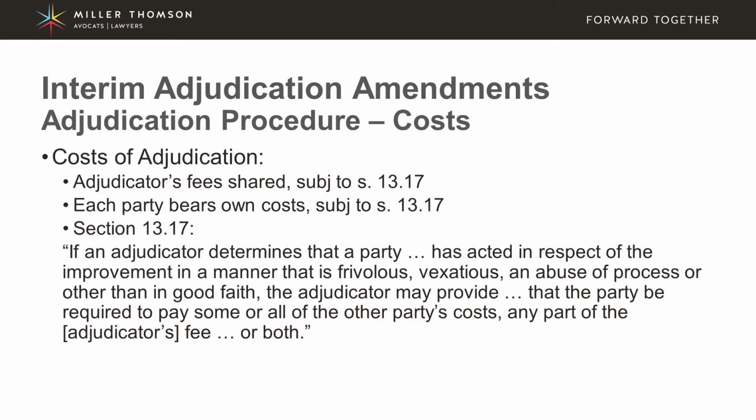So this has some very, very serious ramifications because, as I've mentioned, this can impact the portion of the costs and the portion of the adjudicator's fees that have to be paid by a party to the adjudication. So if a party comes to adjudication and they have behaved in a high-handed and unfair manner on the actual project, they can be punished for that by the adjudicator.